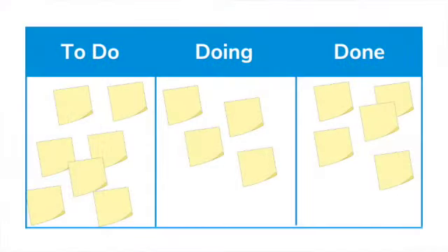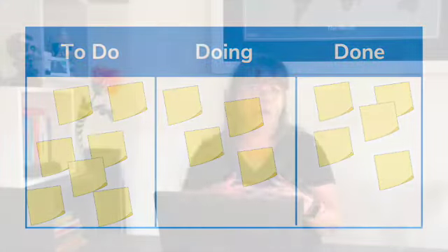And you're actually going to start tracking the activities within this 3-month bucket on their iterations on a Scrumban board. So taking some aspects from those Kanban visualization boards, the Scrumban board is going to actually be a little bit more simplistic. And what you really need to make sure you have is a to-do, doing, and a done column. You can absolutely break that down further if it is something that you need to do from an organizational perspective, or if oversight sort of dictates that you keep a little bit better track of things. But the main headers or the main overarching columns are just going to be to do, doing, and done.